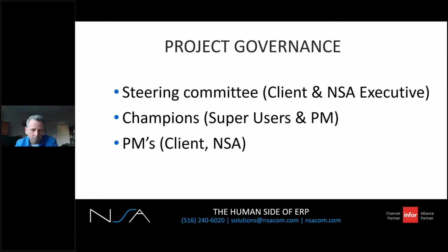You get an early warning when anything starts to go off target, and you've got it supported from the top. Number two, schedule weekly meetings between the champions and the internal project managers to ensure the champions are progressing on tasks on time. Remember, the job of the PM is to get them help where needed. Third idea here, schedule weekly meetings between the internal and external consultant to confirm the tasks are progressing as planned.